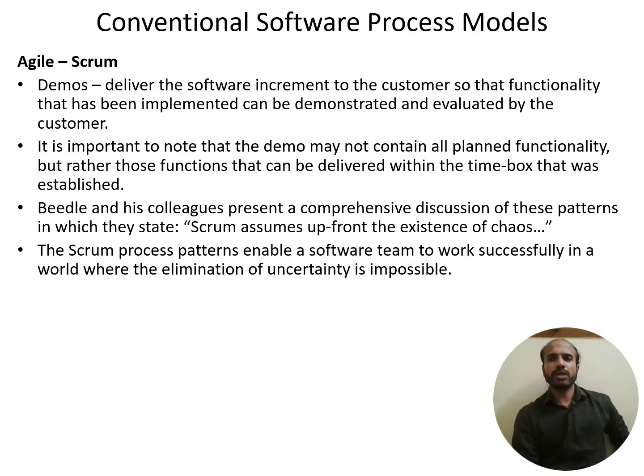the feature will be evaluated by the customer and they will try to understand if all the features have been incorporated properly or not, and they will try to provide their feedback. And this feedback will not be attended to by the Scrum team immediately, but it will be kept in the backlog. That is not the sprint backlog, it will be the product backlog.